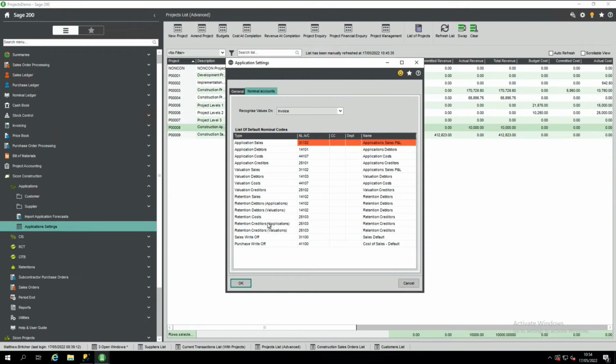Okay, so we've got a bunch of questions here. Gross value now showing as actual cost for reporting. What happens with postings made for retentions? So I think a lot of those retention postings, because we split them, so £100 to make the numbers easy, £95 would have gone to the P&L as one posting, and then we had £5 for retention showing to give you a total. So we've basically flipped that over and gone, if you're going to post the £100, reporting becomes simpler. That's your revenue.